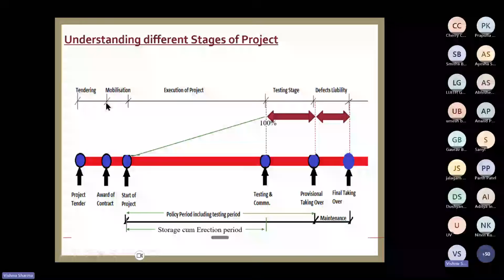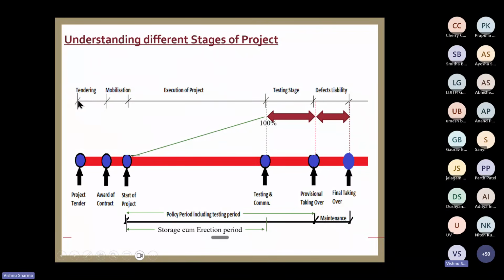After then, there is some period when the contractors submit tenders, then they are evaluated, technical evaluation, financial evaluation. Then lot of queries are there in big projects. Many times these contractors ask various clarifications. Once all those clarifications are given, then final selection is done and ultimately one contractor is selected for execution of this project.